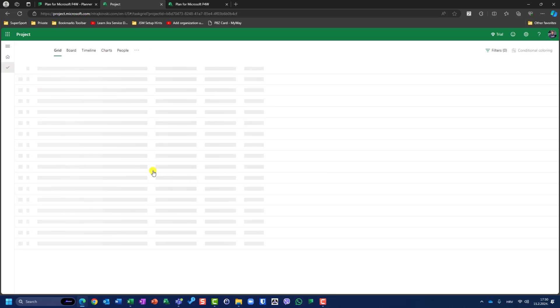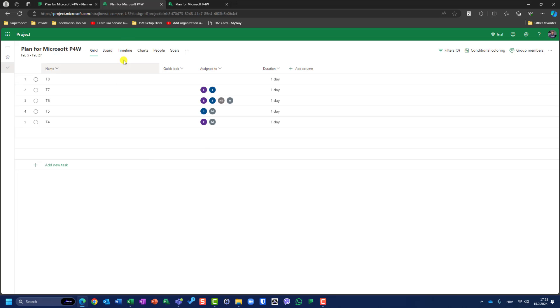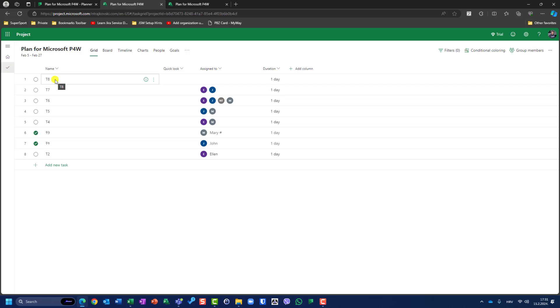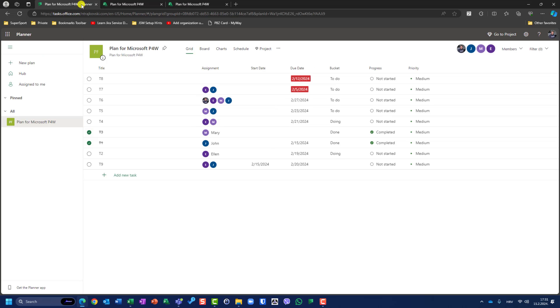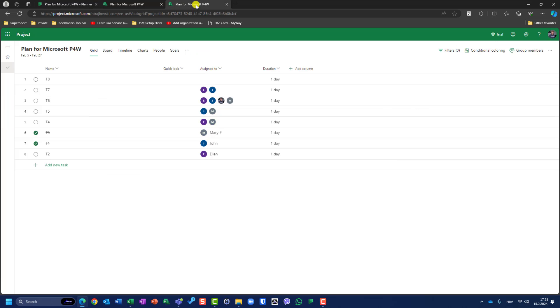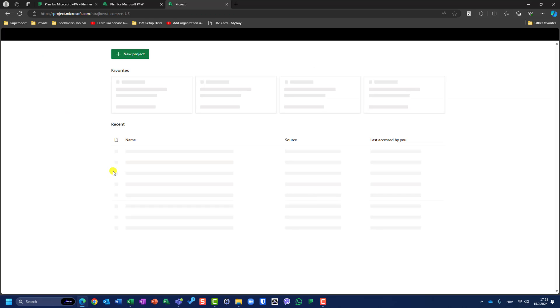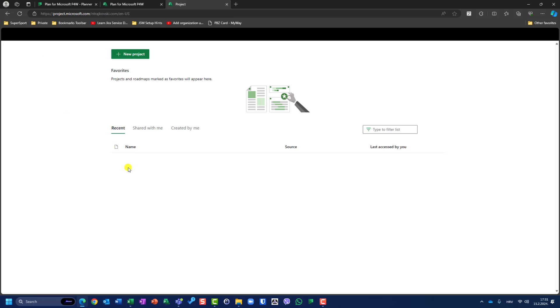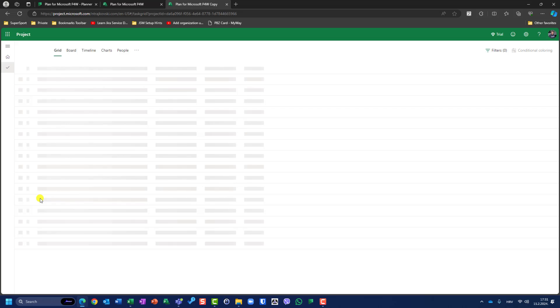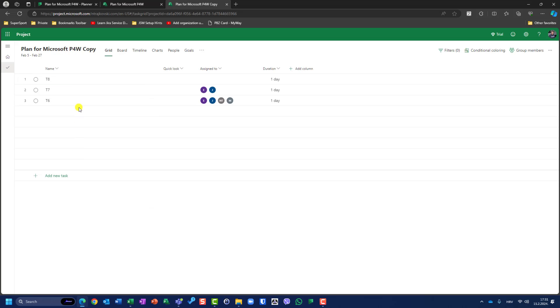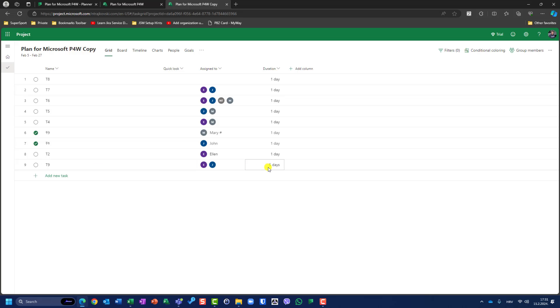When I added in Microsoft Planner a new task and I exported the whole project, the whole plan for Microsoft Project is exported to a new project. This is the new one. You will see here in this one, I have task 9, and duration is calculated according to start and end date. So this is great.